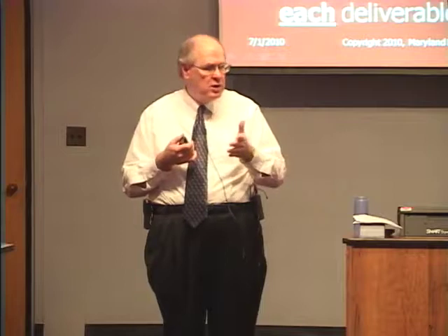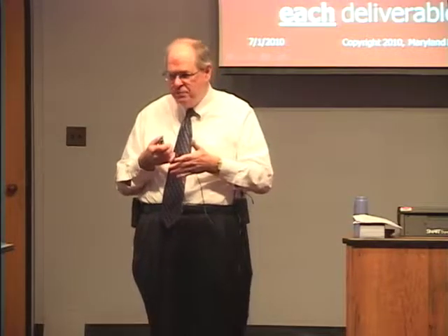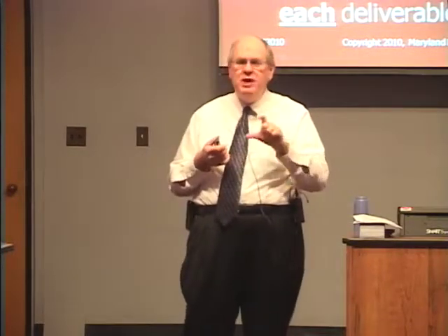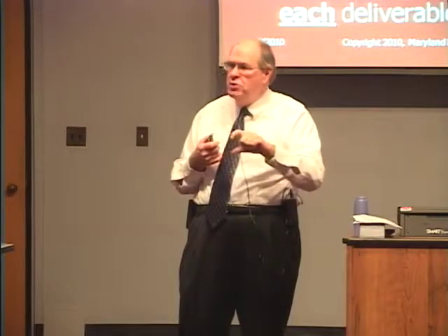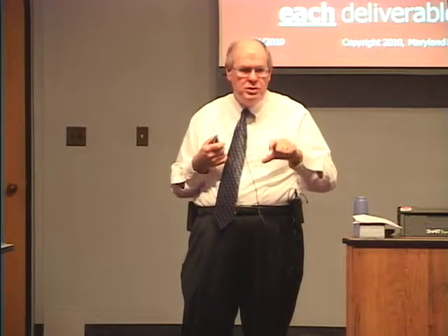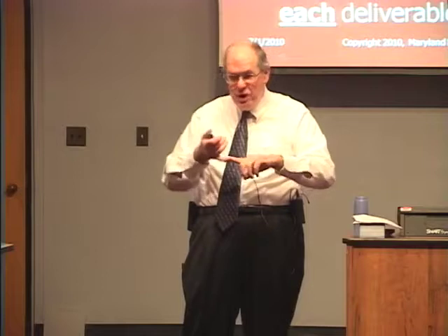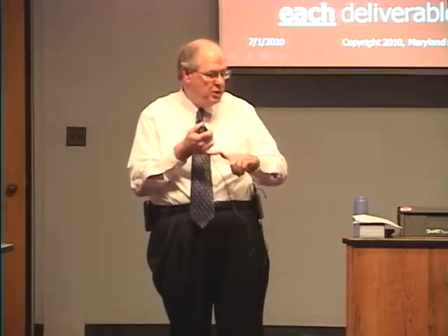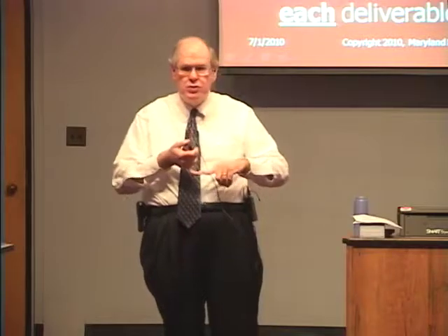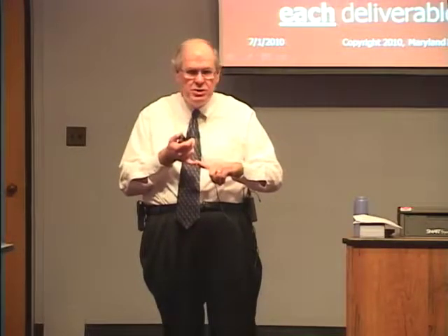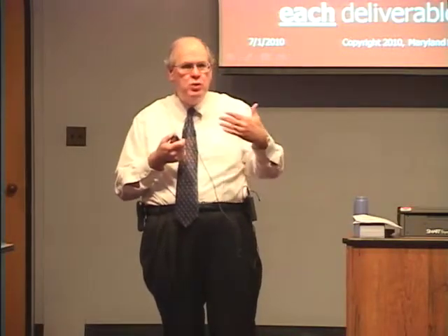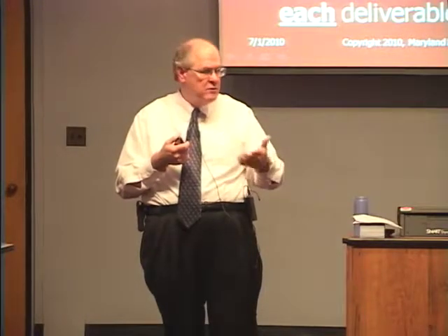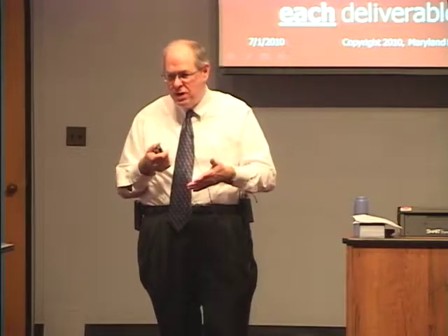And then once you have done that and have this in a document, the suggestion is that you include that document in your specifications as an attachment so the vendors can see that you have taken the effort to complete this checklist. They can see that you have exerted that effort to at least list what the deliverables are, what the timeframes are, things of this nature. That goes more than halfway towards convincing a vendor that you're going to manage the contract.